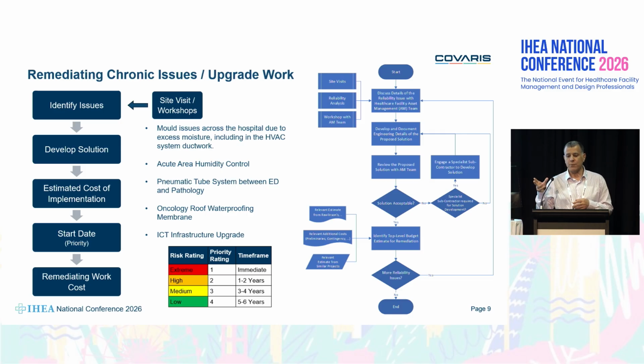And one important factor for defining the cost of this project: for example, we might go to Royal Instance and say, okay, 2 cooling tower replacements, $500,000 each, it ends up at $1 million, and they claim that it includes the installation cost. But then for a running hospital, you look at the staging and all the additional costs for contingency, and make sure that we can stop the main hospital while we're replacing 2 cooling towers in 2 months, or, for example, a sewer stack, we can't stop the whole sewage system to replace the whole stack.